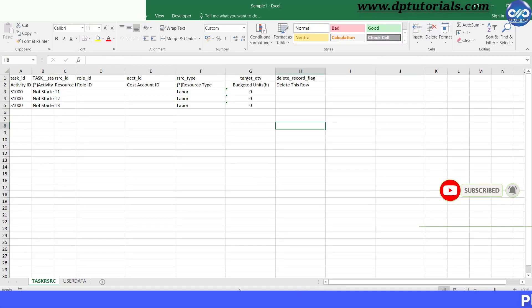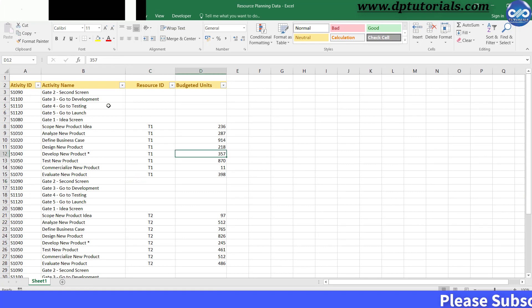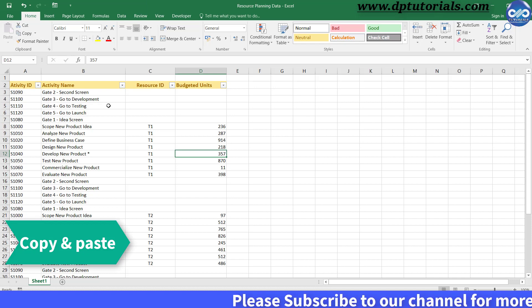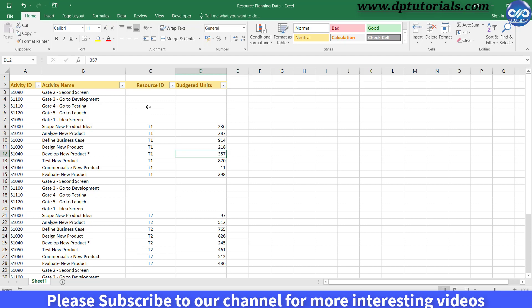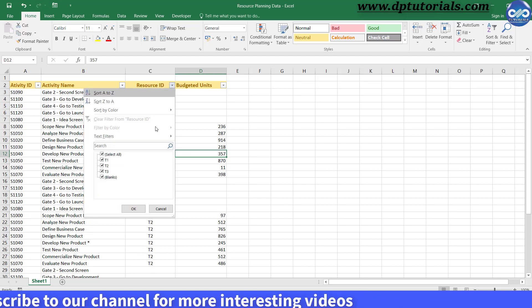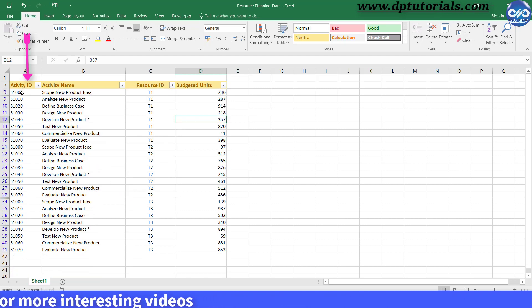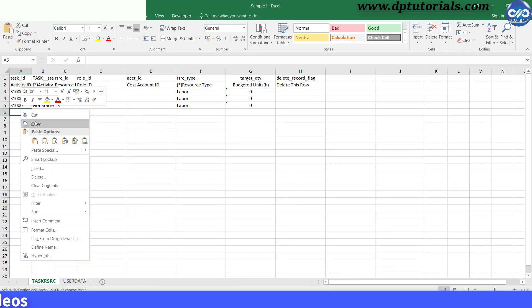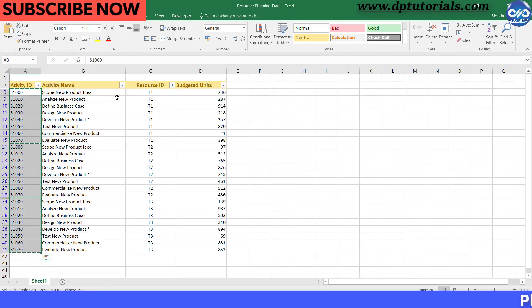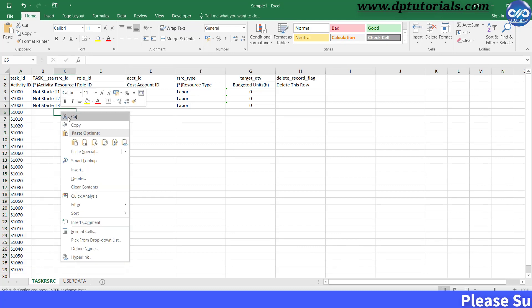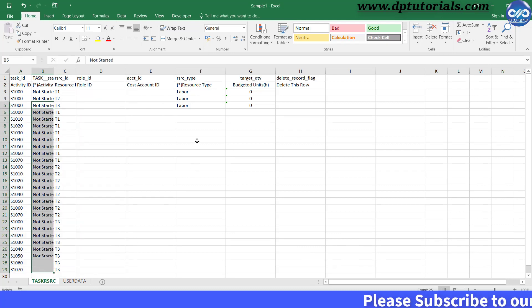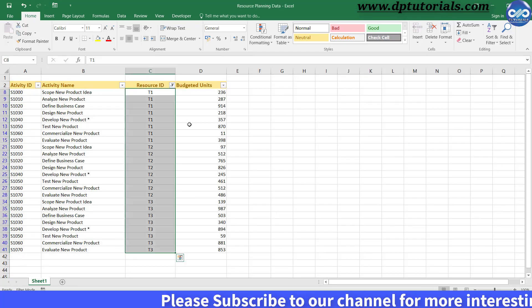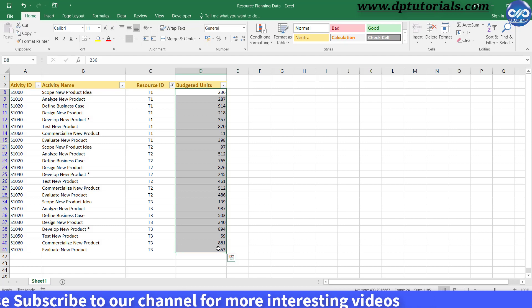Now, edit this resource assignment Excel sheet. With our original planning sheet, I copy and paste relevant columns data into this exported file like this. First, I will filter those activities with resources, that is unselect the blanks. And then select Activity IDs and paste it in the A column. Then, copy the resource IDs and paste it in column C. And mark all the resource as labor in column F. And copy paste the budget units into column G.